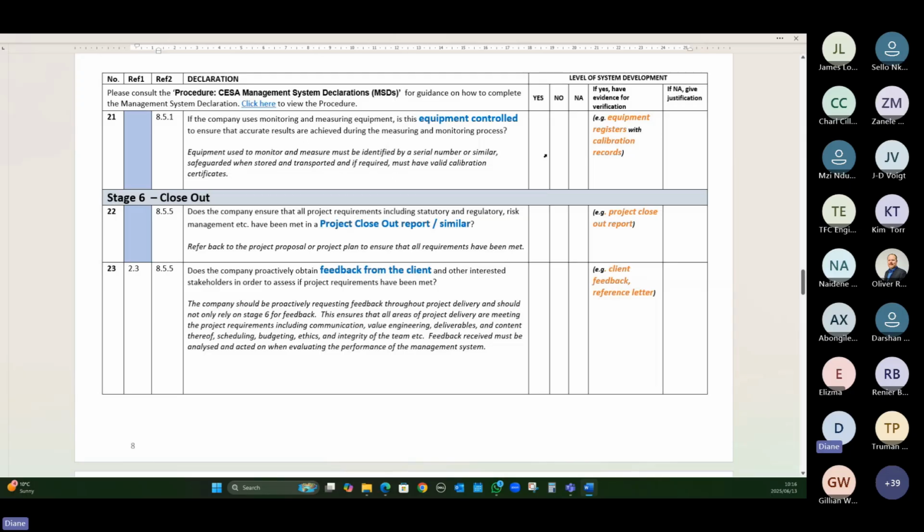A lot of this is taken over by our contractors. And I think also we should still have a level of responsibility here to make sure that our contractors are using equipment that's controlled. So generally, if I'm overseeing a site and I'm seeing the contractors appointing maybe testing labs or whoever, make sure a testing lab is SANAS accredited so that they are actually being reviewed by an external body as well, making sure that all the equipment they're using has been calibrated correctly.